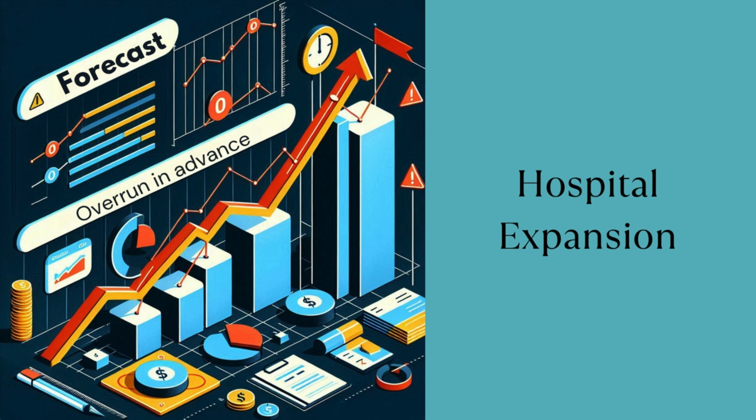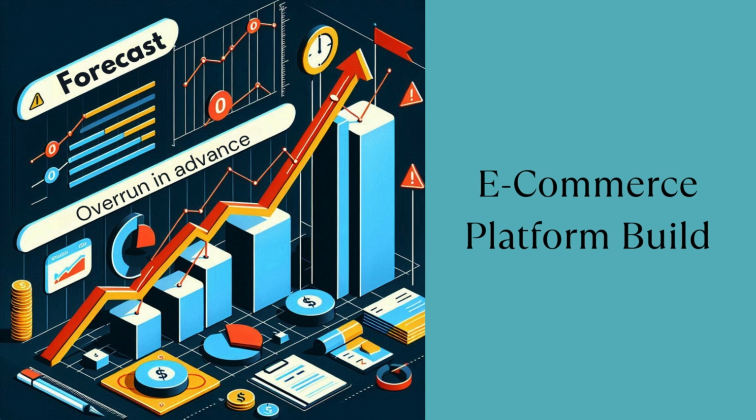A healthcare project used trend charts to predict equipment cost overruns. They renegotiated vendors based on trend slope forecasts, not emotion. Over $1 million in capital expenses avoided. By tracking SPI trend lines across sprints, a digital product team realized that late QA cycles were the issue, not dev speed. A simple QA reallocation brought SPI back up, keeping the launch date intact.